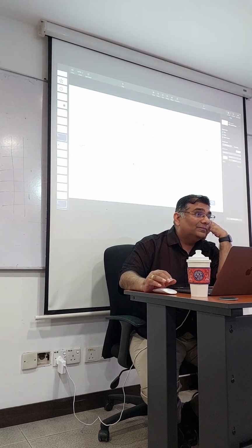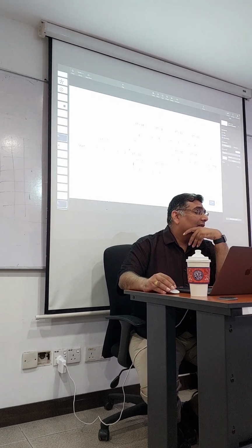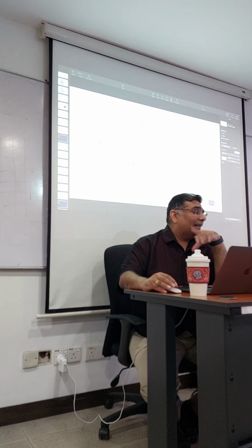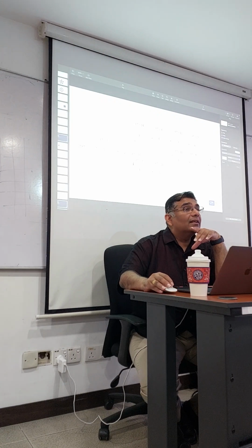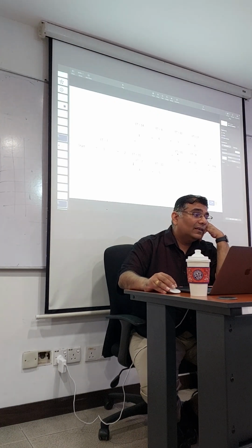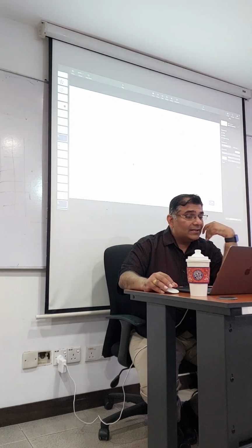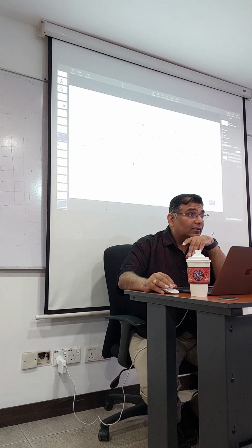But anyway, you have to do EOT. First, calculate the longest path, the longest jalan. Which one? 1, 2, 3, 6, 9, 10. Longest, how many days? 73 days. 73 days, yes or not? Yes.